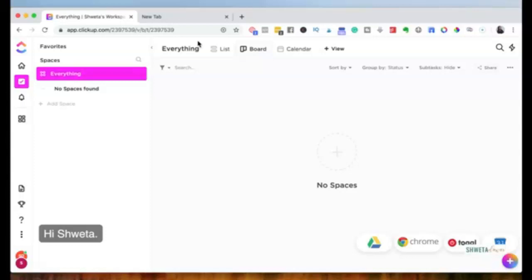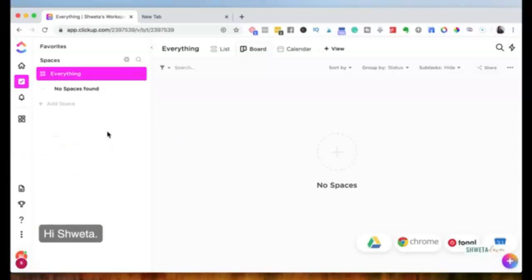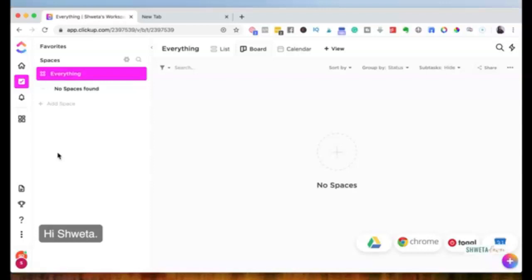The other key thing is the hierarchy. We are inside one workspace, which is your business or personal workspace. Within the workspace you have multiple spaces, within spaces you have folders, within folders you have lists, and within lists you have tasks — and then checklists and subtasks. I'll provide a flowchart of the hierarchy since it can be a lot to take in when you're new to the platform.